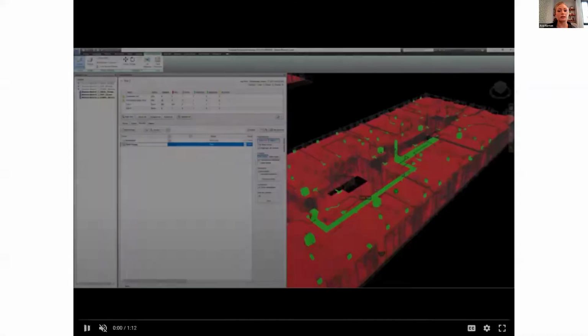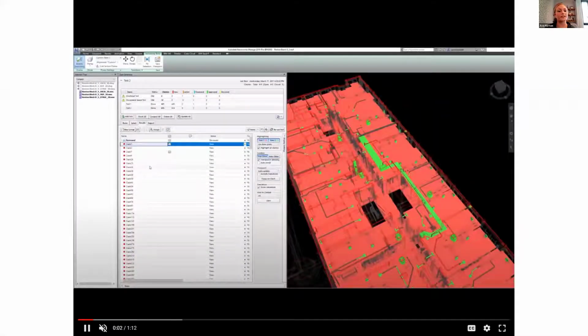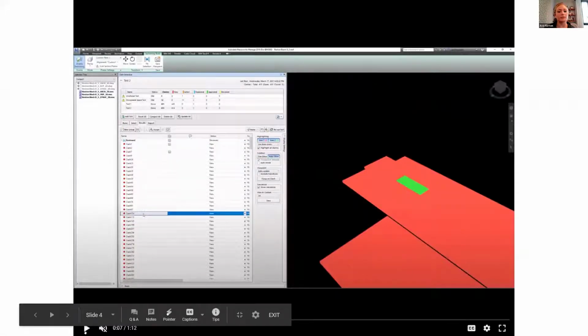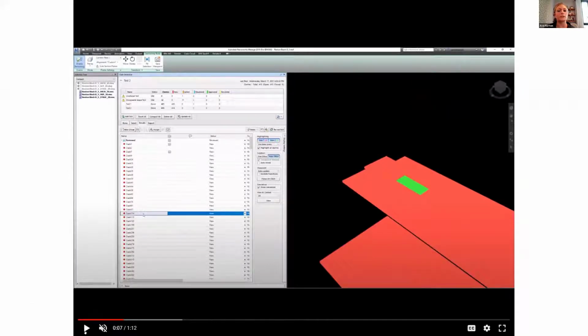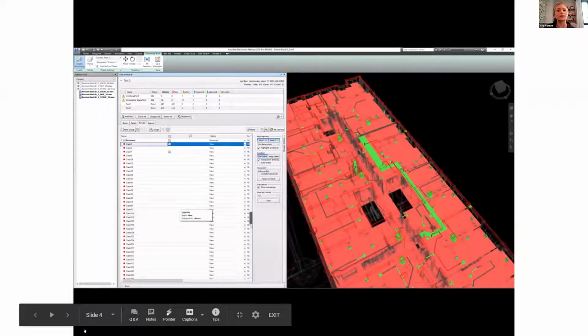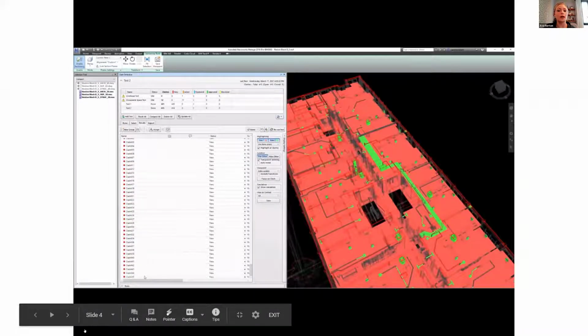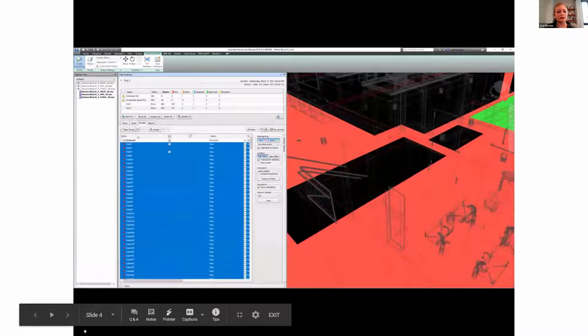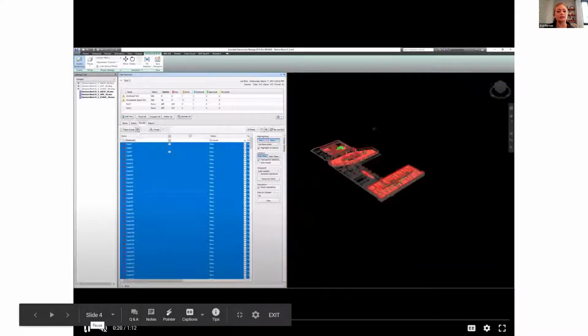So what we first start out with is really just looking at high level, all the clashes in a particular zone that we've highlighted. So we're looking at examples of what clash detection looks like before you do anything with it. And I think everyone on the call is familiar with this. Towards the end of coordination, when we're in more granular issue tracking, like hangars and things like that, we may still look at it like this, but we like to lump it together and look at more high level in the beginning. And the way that we do this is really to just pull it all together by one zone and create a group. And then we work backwards by deducting similar issue types together.